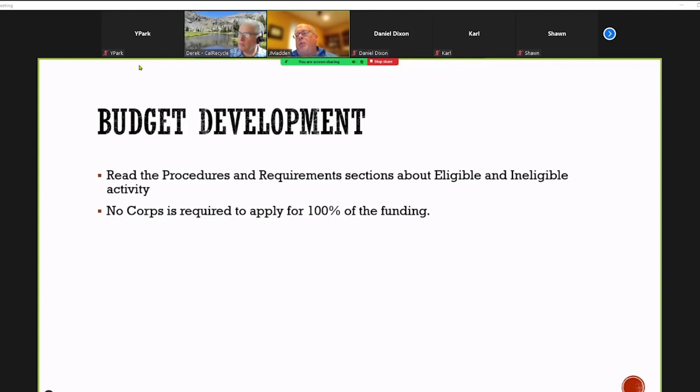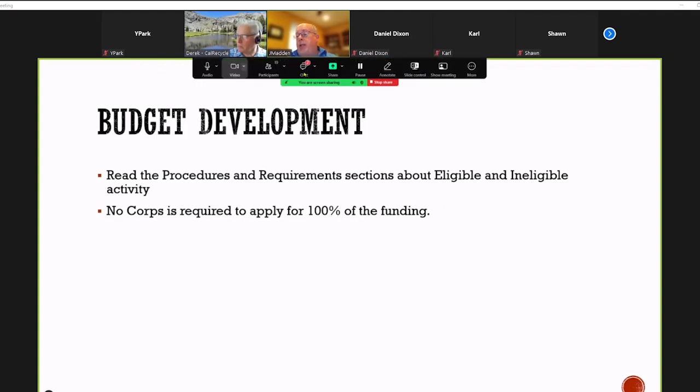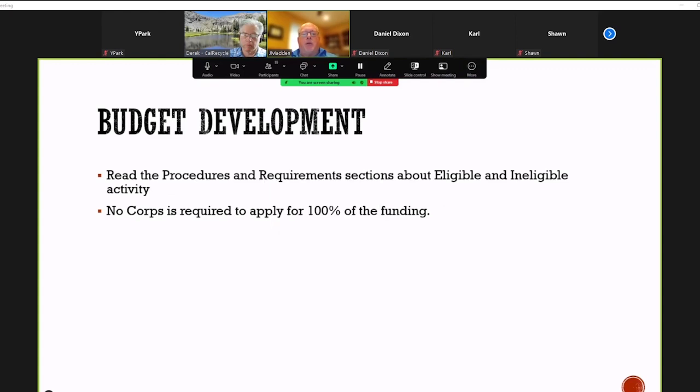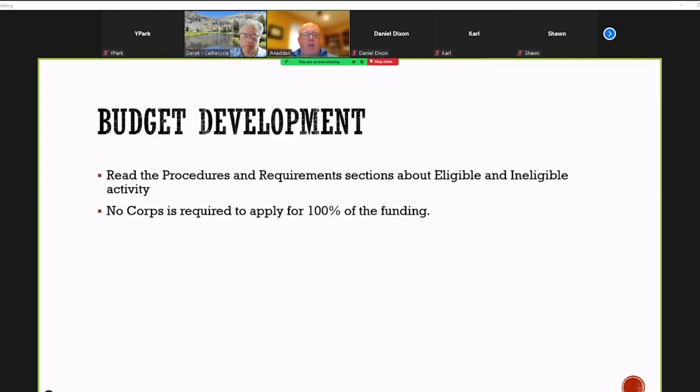Which plays into it if you have a change in your work order or your scope of work. If something happens where you need to add or take something out, then this document also needs to be changed to do what's called a grant project summary modification. All right. Thank you, Jim.